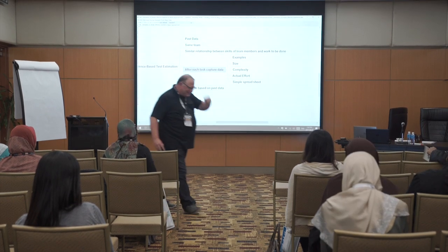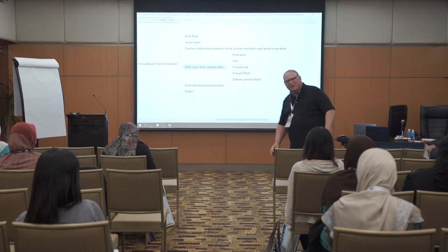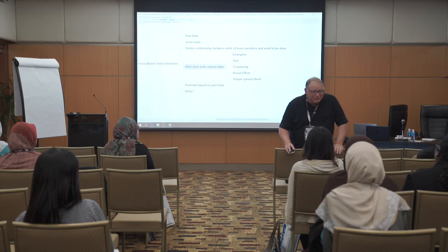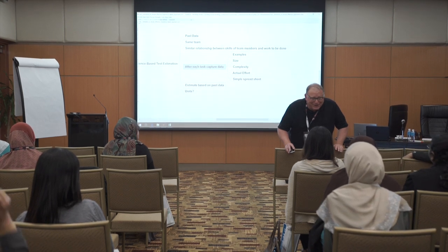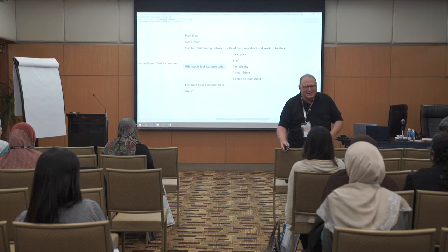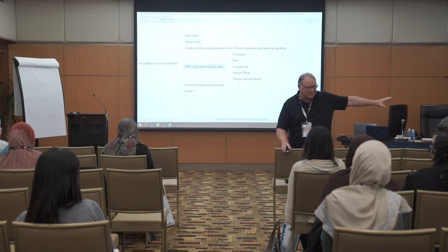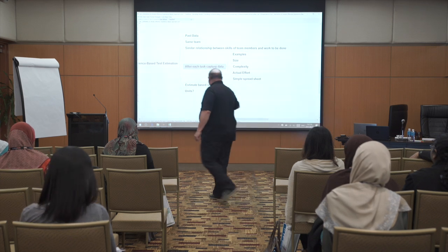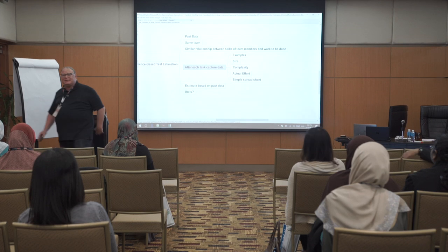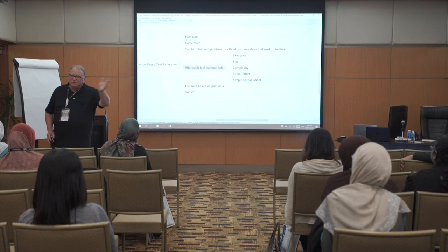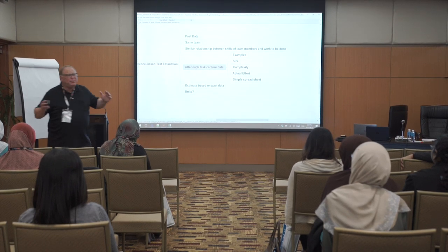For every story, or every task, I collect 2 dimensions. Size: how big is it? For a testing project, usually it's how many conditions do we have to consider? How many factors? More factors, bigger. Fewer factors, smaller. It's not the size of the software. This is not a function point analysis, right? We're talking about collecting testing task data. Then there's complexity. Complexity has to do with the technical work that was done to create what you're testing. Was it easy? Was it hard? Was it complicated?